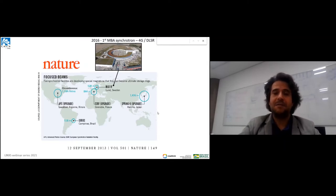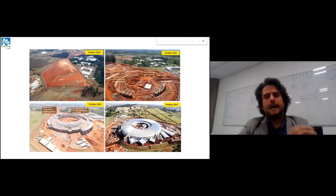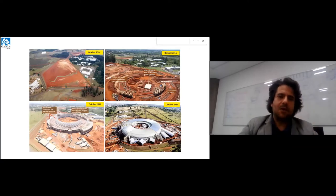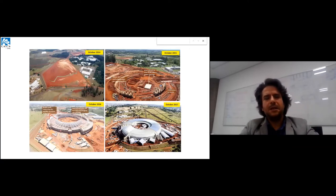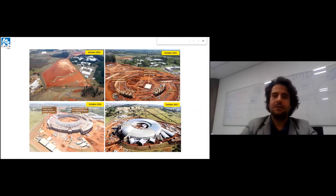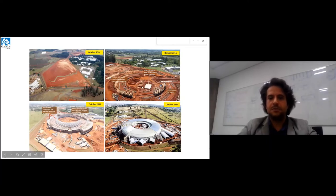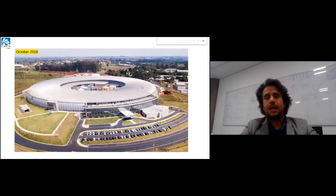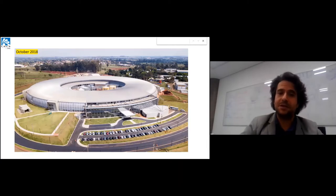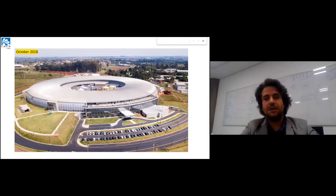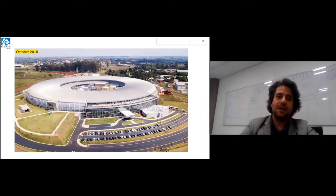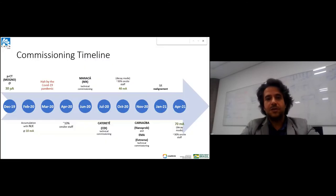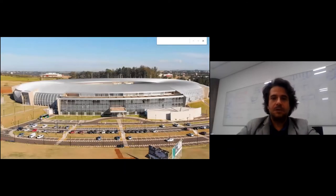After these discussions and the project change, we started in 2015 with the first stone and construction in a Greenfield site. You can see the evolution of the structure construction, and in October 2018 we had the building ready for installation of the machine. That's when we started storage ring, booster, and Linux installation.